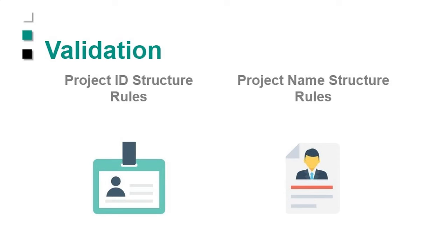If you're a contractor and you provide files, often what we see is kind of the reverse. What we see is our clients who are contractors that might have resources or costs, things that they don't have to provide the owner because it's a lump sum contract. They do the opposite. So instead of scrubbing it when they get it, they want to pre-scrub it.